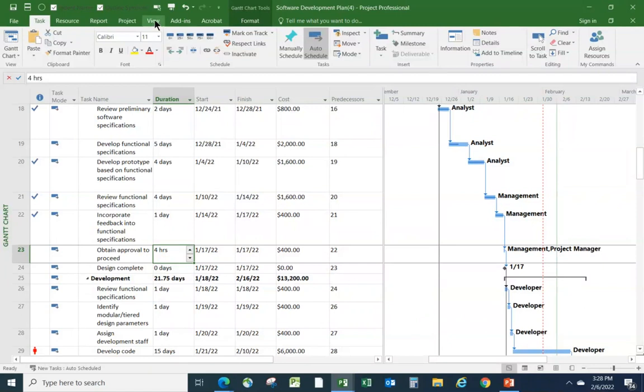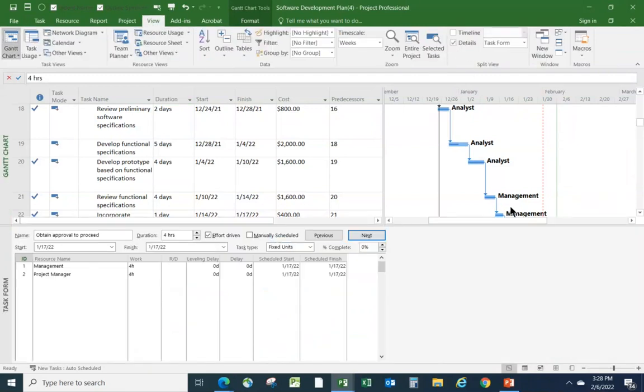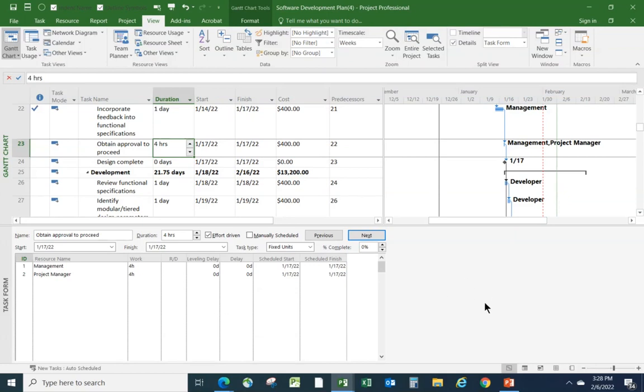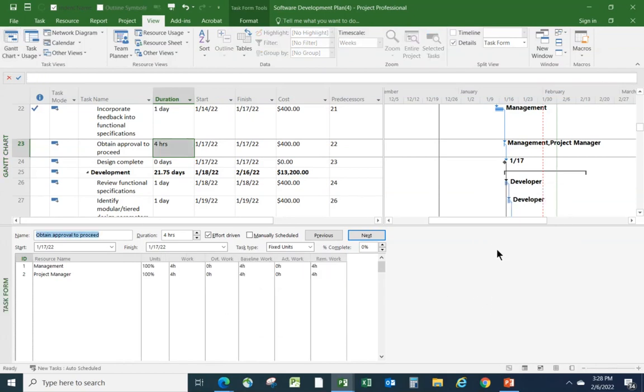And speaking of details, let's click on View and click Details. In the top area, let's scroll down a little bit to get that task visible for us. That 4-hour task. Let's select it, in fact. And down at the bottom here, let's right-click and choose the Work tab. All right, in this big gray area, right-click and choose Work. And I've got this task selected. And let's take a look at what this is showing us down here. It's showing us that both resources were assigned a full 4 hours on that task. It's a 4-hour task. 2 resources were assigned 4 hours each.